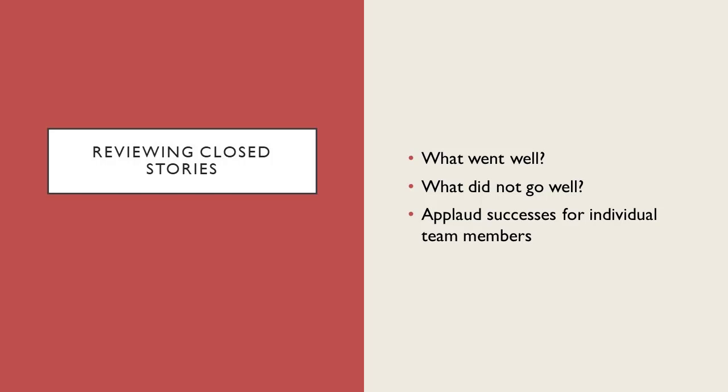Obviously, you want to talk about those items that did go well and function properly. But sometimes there are instances where you complete something, but it was a nightmare to scramble and get it done. Maybe it took double the amount of time, but was such a high priority that you had to reassign resources for it. Maybe there was a blocker that just wasn't addressed right away, and that was a slip up on the Scrum Master's part or on the developer's part.